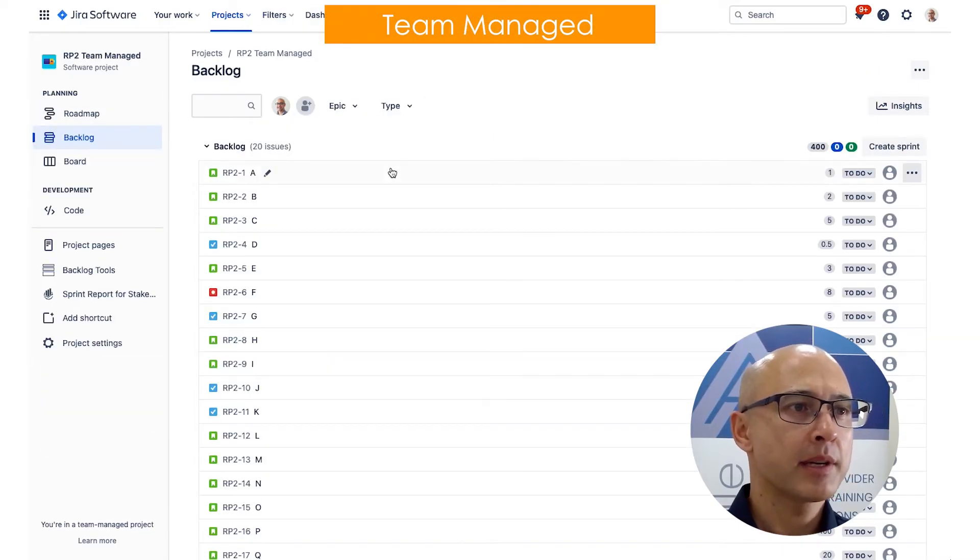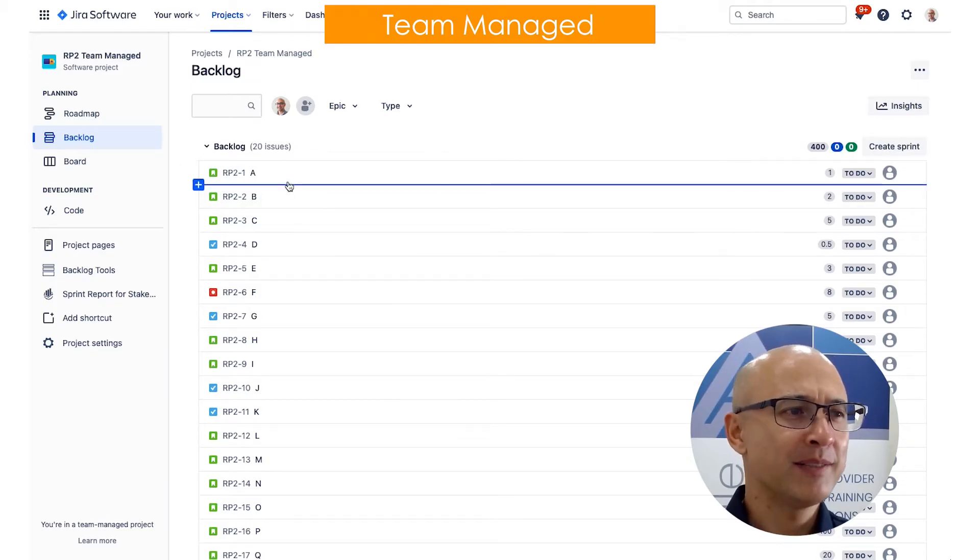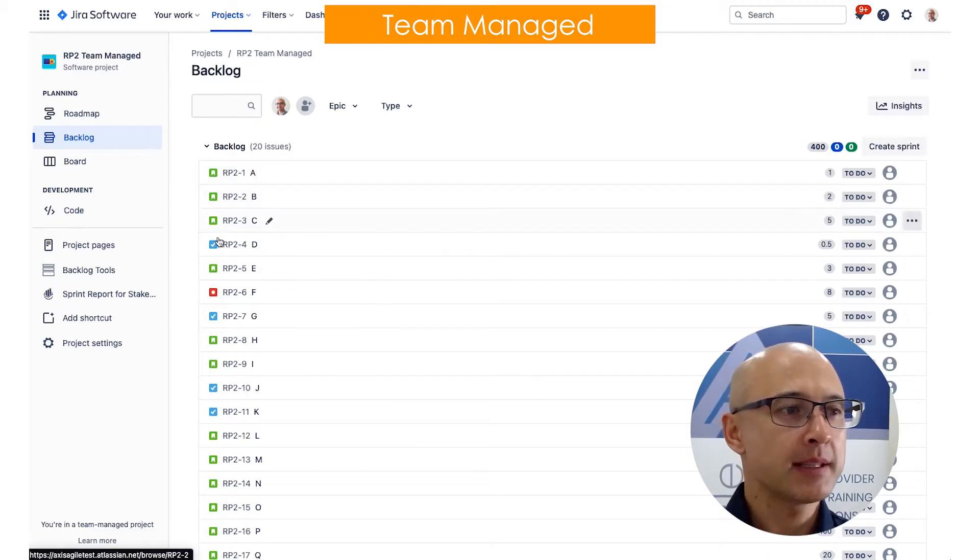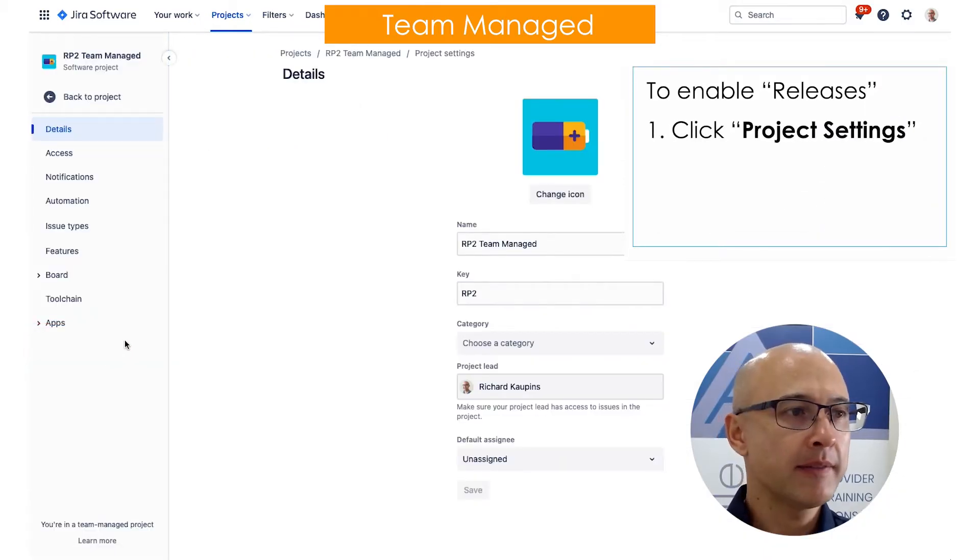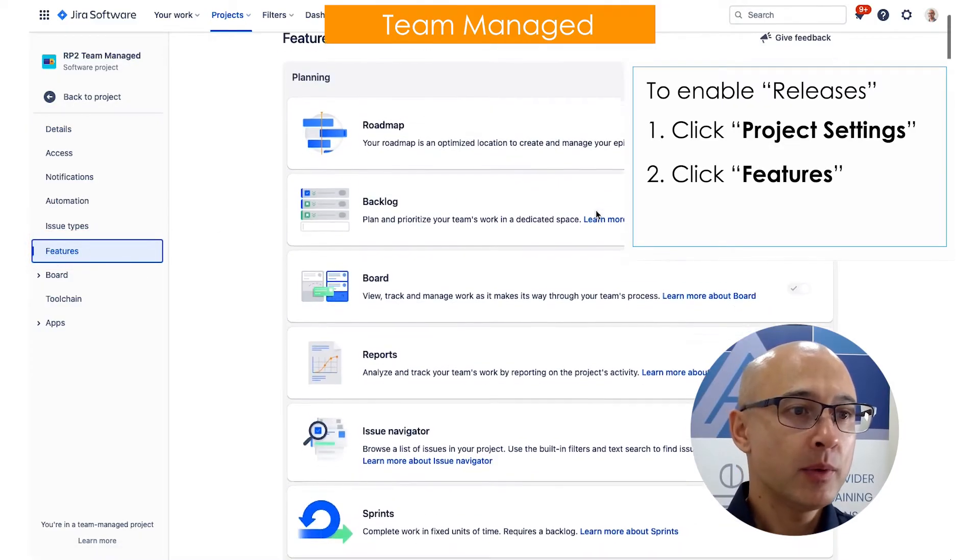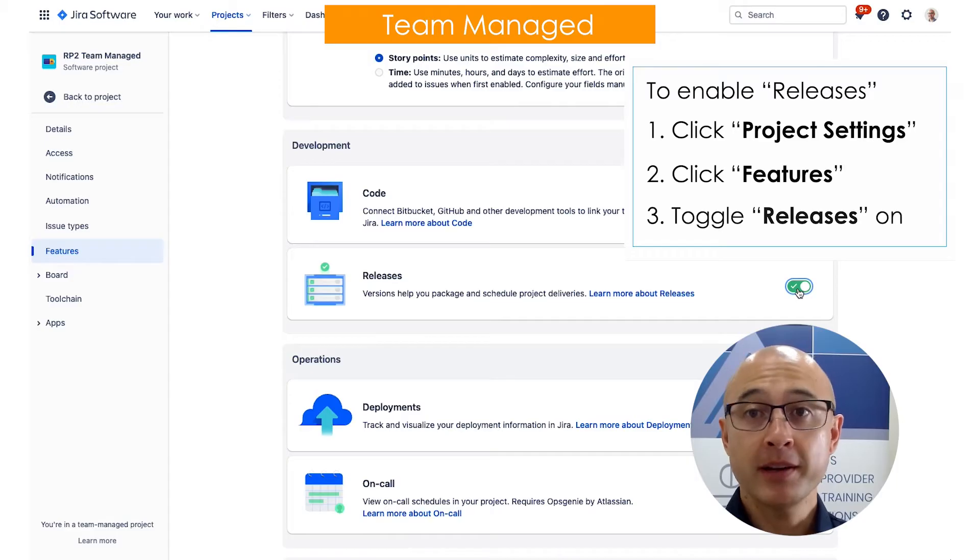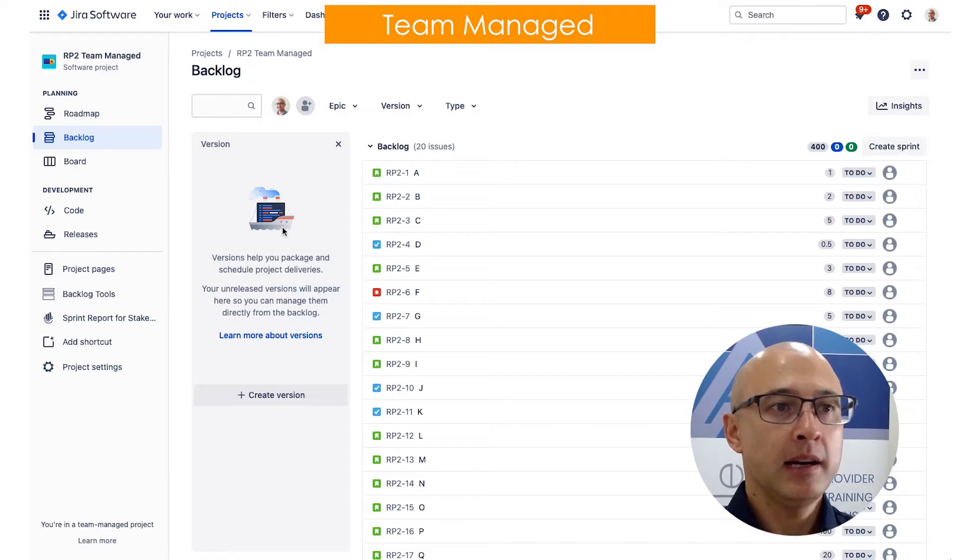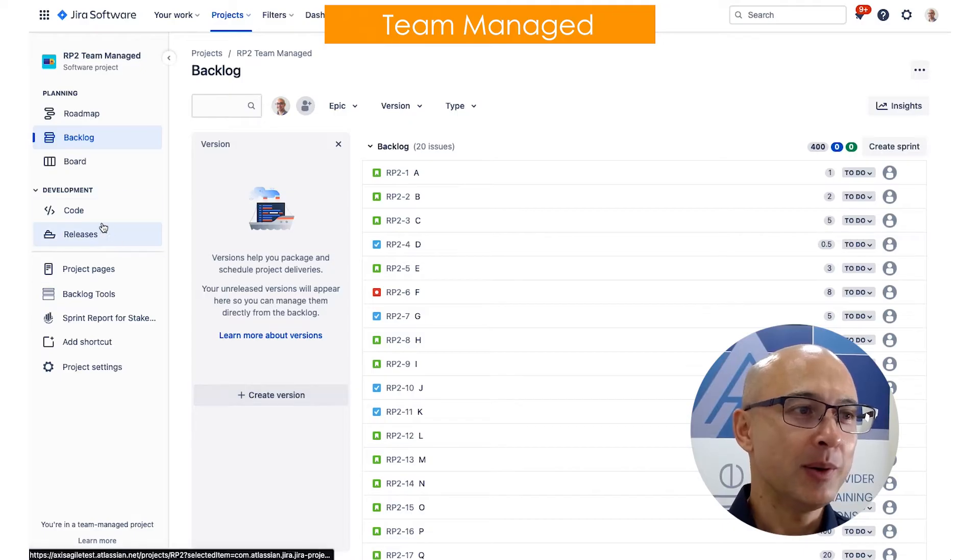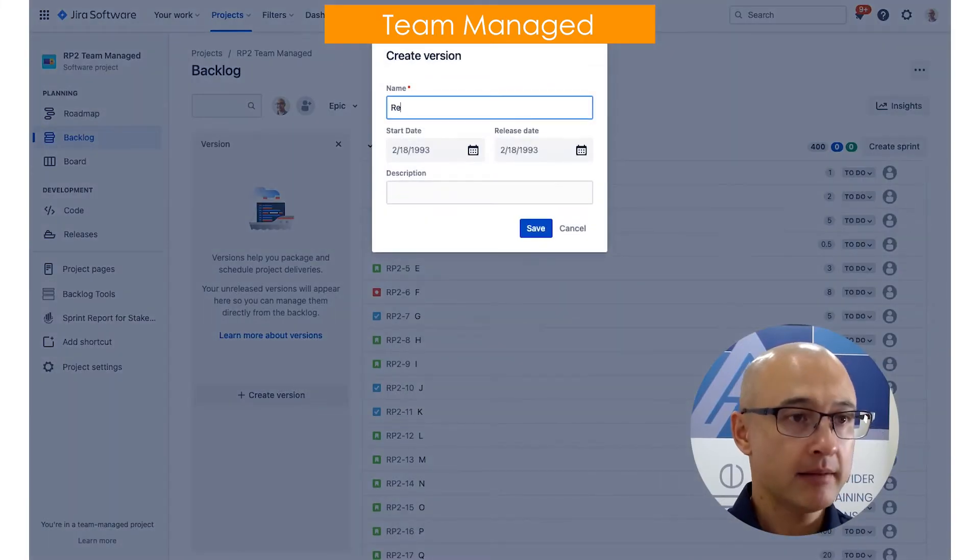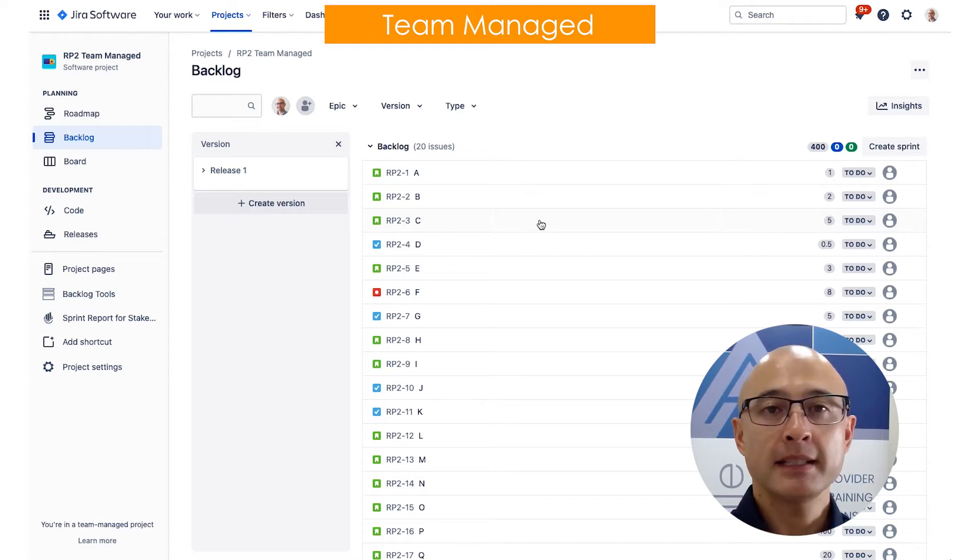So I've got my team managed project here and you'll notice it looks a little bit different. There's no version panel over here, there are no releases in the left panel. So what you actually need to do is you need to enable them as features. And to enable them as features, you click on project settings in the bottom left here, then you'll notice there's a features panel here. And in a list of features, we will see that we have releases down here. So we turn that on. Now we head back over to our backlog view and you can see now a similar type looking panel there. So create version here, and you'll also see that there is a releases tab there.